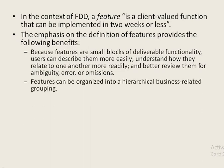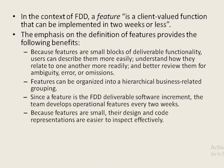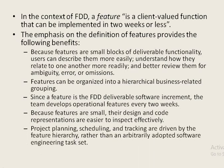Features can be organized into a hierarchical business-related grouping. Different features may share common factors, and features belonging to the same category will be grouped together into a feature set. Since a feature is the FDD deliverable software increment, the team develops operational features every two weeks. As features are very small, their design and code representations are easier to inspect effectively. Also, project planning and tracking are driven by the feature hierarchy rather than an arbitrarily adopted software engineering task set.